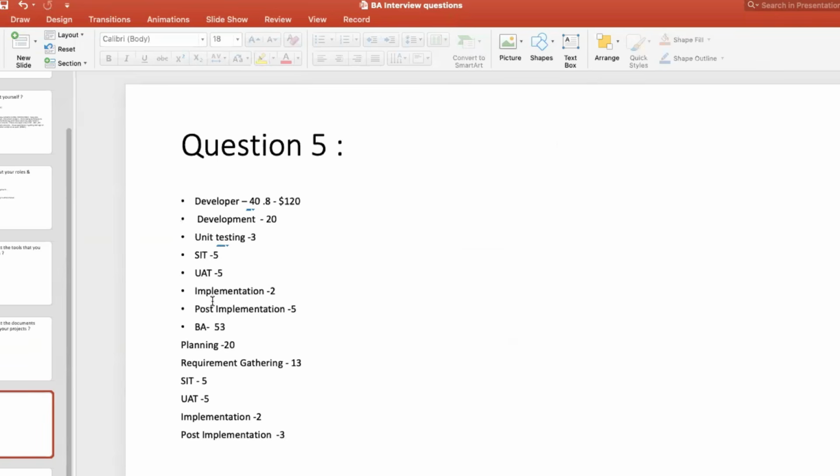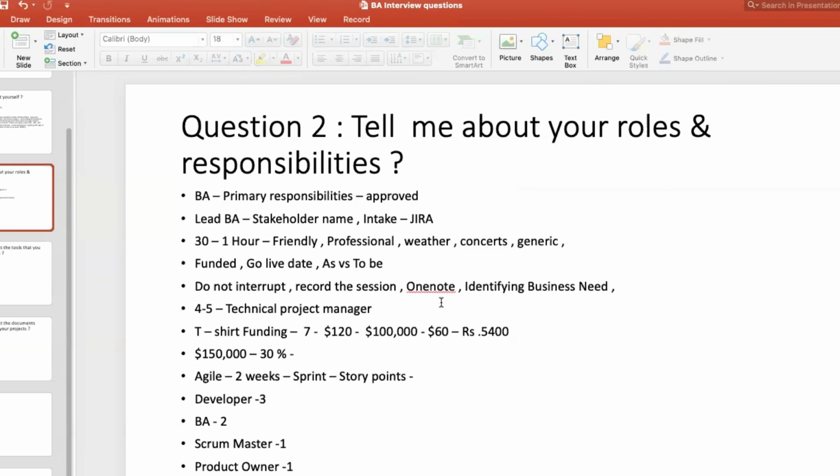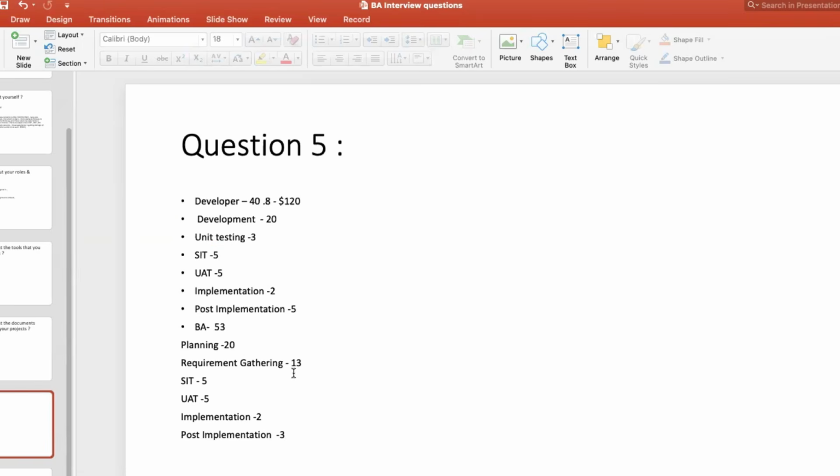Then I have to explain why this is taking so many hours, what kind of technical difficulties we are having, and why this cannot be done on a much smaller budget. Or if they are going to take away a few scopes, let's say for the chatbot, for now phase one, it only answers claims questions. Yes, we can do that on a low budget, because now we are dropping other teams' dependency. We are dropping prior authorization, appeals, and enrollment. Only claims questions that the chatbot will answer, that is phase one, totally fine. We can reduce all the story points and give you a much lesser budget.